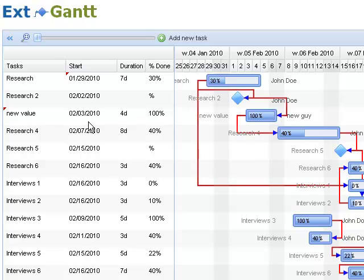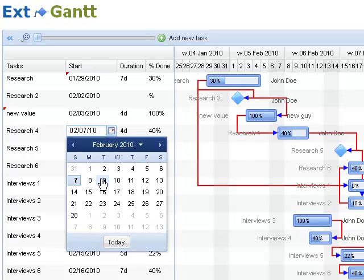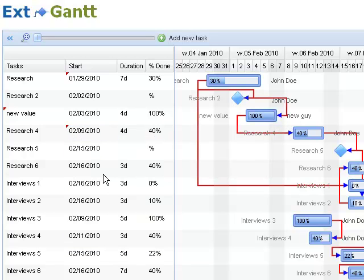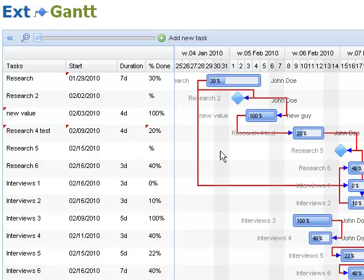On this side, in the locked part of the grid, you have the opportunity to set a new number of days. You see that automatically updated. And here's the date picker. So this starts on the seventh. Let's change it to nine. And it moves automatically. You also have a little spinner field here. So you can change the percent done right away inline. And you also have a double click here, of course. And you see that brings the updates here to the field.